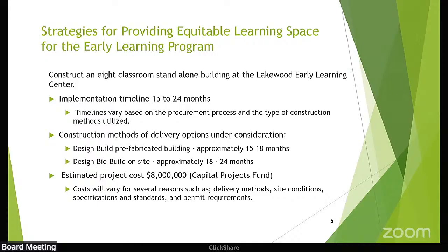We felt we don't have strong enough specifications to walk in and pull that off. You'd be accepting that the contractor makes the changes at that point. They get to decide, if there's a budget shortfall, what they're cutting. So they basically are the designer and the builder in that model. So we didn't feel that model was necessarily the best one for Clover Park right now.